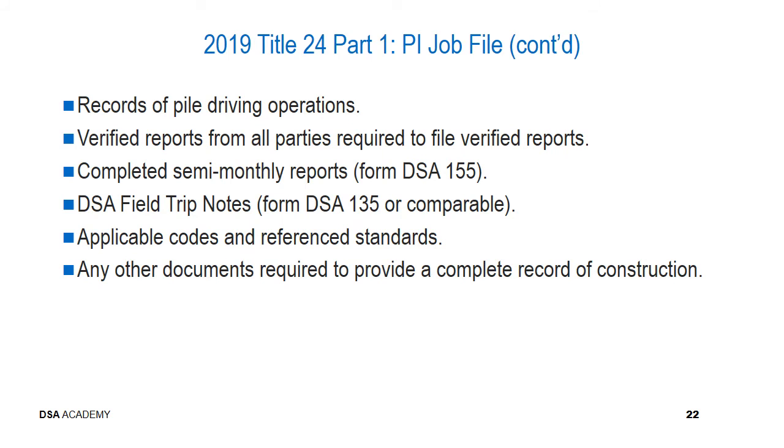Continuing on with the project inspector job file, records of pile driving operations. This will often be provided by the geotechnical engineer or a representative from the geotechnical firm or the testing lab that's involved with the project. Verified reports from all parties that are required to provide such.